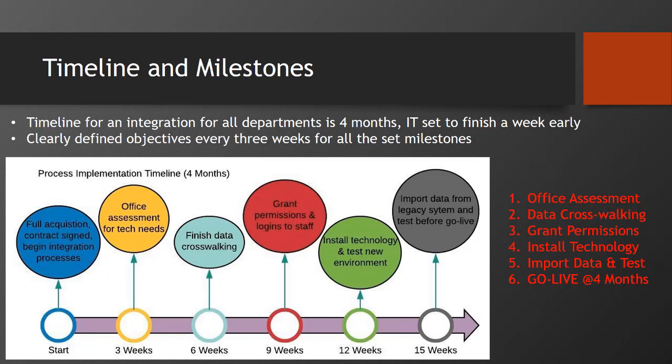Next, we will install the new technology and get it done in their new environment and practice so that they will be ready for their 16-week go live date. And lastly, the week before, the import of data from the legacy system will happen so it can be tested and ready to go for the next week.